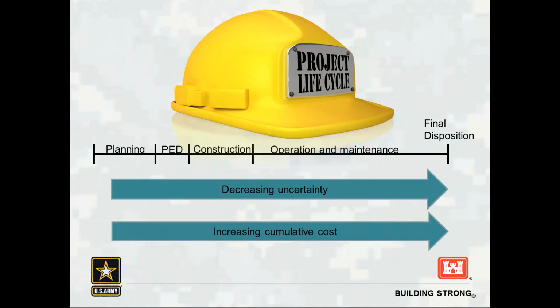But this comes at a cost. We have increasing cumulative cost throughout the project life cycle. That's always going to be a trade-off at any point in a project life cycle. Decreasing uncertainty is going to mean greater cost.